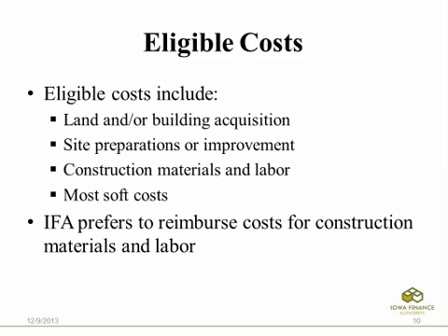If you have extensions for utilities, roadways, things like that that need to occur with the project off-site, just be aware that those are not home eligible. And when we go into the budget in a few minutes, you'll see that in the areas where those off-site improvements are located, you're not able to enter home in that section. So we'll cover that in a little while as well.